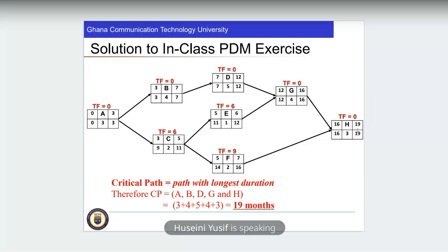Yeah, I wanted to say, by glancing through, what you have to do is to use the TF equal to 0 to see the path, right? Exactly. So again, Bruno, we can use the total float to tell the critical path, because the critical path is not affected by any floating activity. So the TF at the critical path, you can tell. That is the very quick way to tell the critical path.